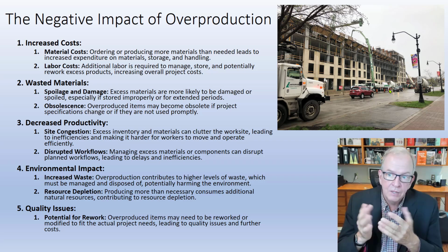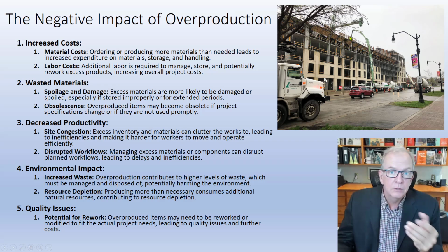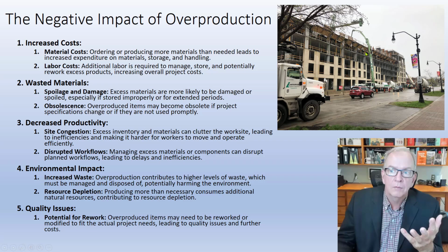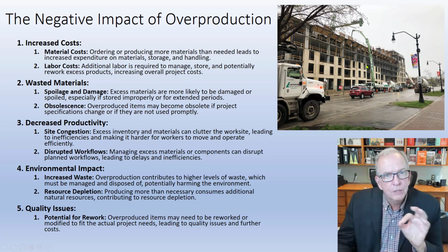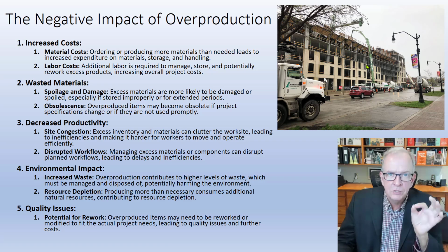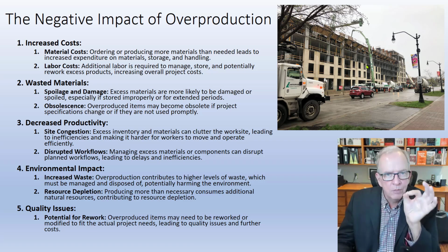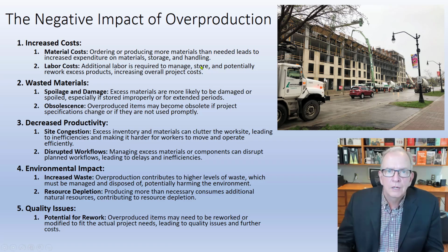Capacity buffer, again, you've got maybe an extra pump truck if it's a really important pour. There's some waste in that for sure, and there's some extra machinery. So you have to look at the tension between the two, and you want to have enough of something, but at the same time you don't want to have too much extra. And if it's because of the way that you've been doing your orders, your estimates, and they haven't been done that accurately, how do we make improvements there so they're a little more accurate, and then we can have a little bit of extra there without being too much, and then we work to reduce it as we go along.